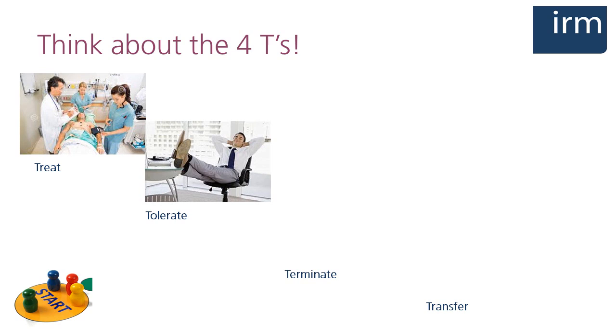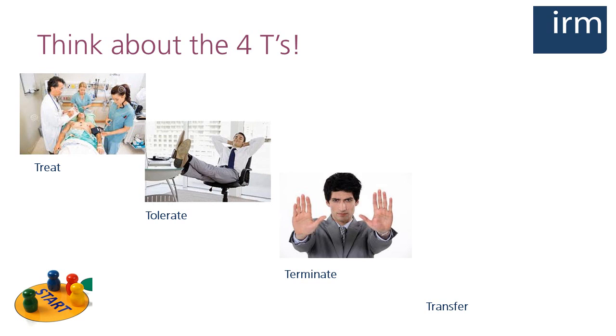So an example might be where you're working on a new project where in the early stages there's quite a lot of uncertainty. You might not know quite how service users are going to react to the project, and you might assume that they'll love it, so you decide against action. But then a chance meeting with some service users suggests that actually you'll need a major communications campaign to win them round. And terminate, I suppose, is the opposite of tolerate.